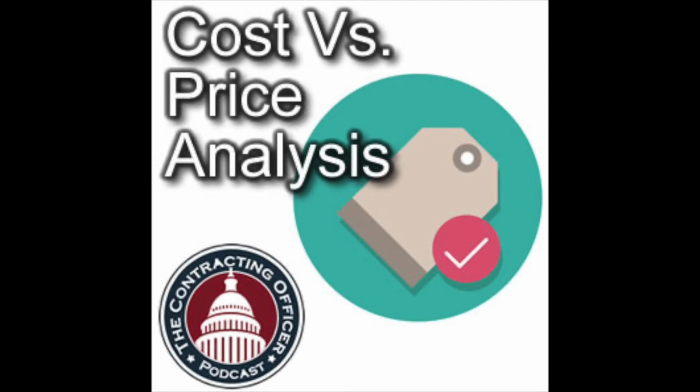So industry, if you receive a request for an engineering change proposal that asks for reams and reams, hey, is that even a thing anymore? A ream, a volume for pages and pages. If it asks for lots of cost data, this is a good chance to talk to the government and say, hey, we just did all this stuff under a competition, and you said it was fair and reasonable then. Here is why our proposal now is comparable to that. It should still be fair and reasonable.